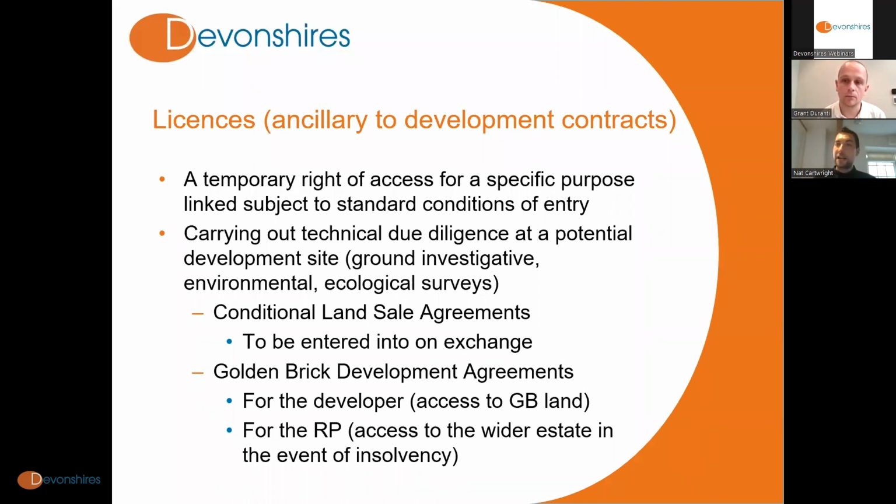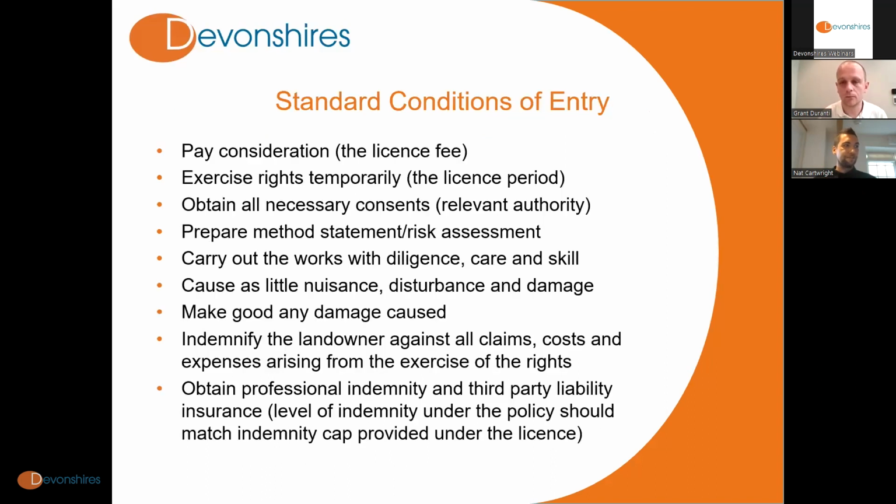It may also be necessary for you as the potential buyer to have a license provision in there in the event of insolvency by the developer. The reason being that if you've only acquired a certain parcel of a wider site, but you need to build out the rest of the site where you have other units, then you're not going to have a legal interest in the remainder of the site. You're only going to have a legal interest in the bit that you've acquired. And so you will need a right, if that's written into the contract, to build out the rest of the development. So they can be very useful tools as ancillary documents to contracts as well.